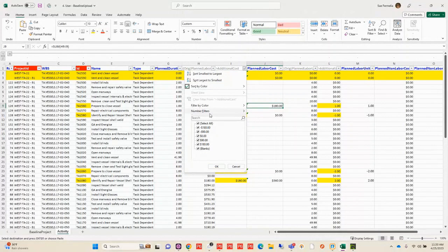I would go in and I would load it. It's just asking me if I want to discard my changes. And when I do this, I'm pulling out an activity sheet. So every module that has the little pencil by it allows me to customize what columns I want to bring out on that particular activity sheet, because there can be a lot, as you can see. So anything that's on the left is what would be available to put on my sheet, and anything on the right is what's actually going to be pulled out.